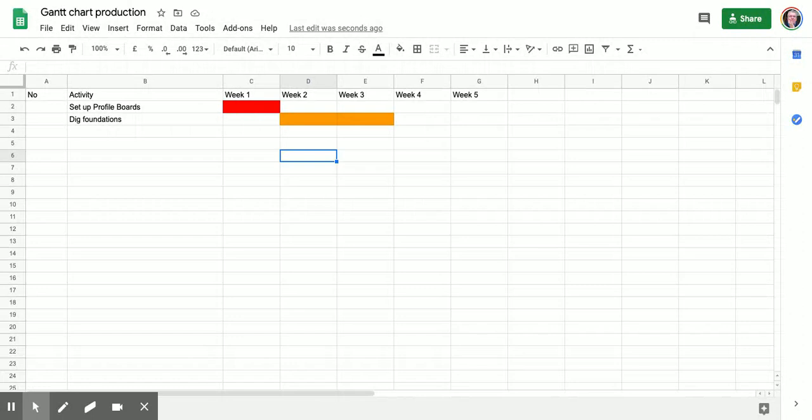for that particular plot. Now on another job where we're into virgin territory, I may actually put in front of this secure the site, and then also protection of equipment, in other words, a storage area, a compound, and anything else that are required to set that site up for the health and safety and for the running of the site. Here I'm looking at one particular plot on an existing construction site, so we're looking at only this. And the next one is to pour the concrete.